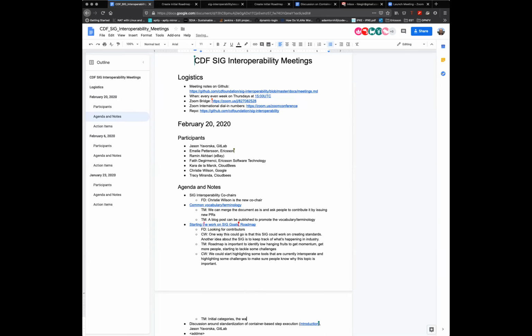And just in the roadmap, one of the things I know they do in MLOps, which I want to go slightly differently, so I'm going to encourage us to do it in this group, is rather than laying out years, you know, we're going to do this in year one, year two, since you can't necessarily predict the timescales, take more of a now, next, later approach. The things we're doing now, we have lots of granularity, we know the specifics, and then we can get people to work on them. And the things for next and later, the further on you go, the more they're big ideas, but we won't scope them till we deal with the things in now.